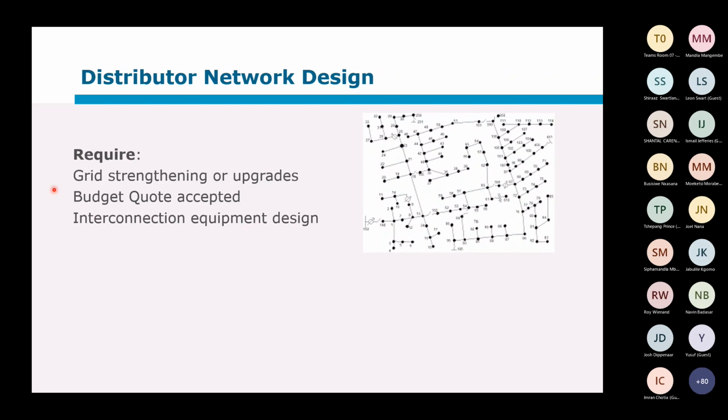Also, before that budget quote is issued, and I think I haven't mentioned it in the training yet, there are several evaluation committees that would look at this. So it's like approval sections. The first one is the technical evaluation committee. So did you actually look at all the alternatives that you should have looked at? Is this a feasible option? Does it technically make sense? Then there's also a financial evaluation committee, which would look at, is this really the least cost option? If that is your policy, is this project going to be beneficial for the distributor? In other words, in the long term, is it going to make sense to do this specific project? Or are we actually just pumping in a lot of money here without any real value for this distribution network as a whole?